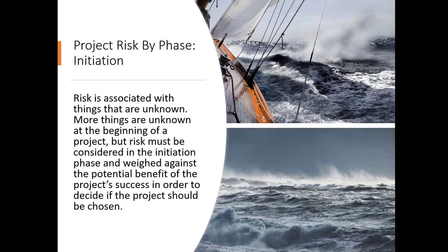So project risk by phase. Let's look at the initiation phase. Risk is associated with things that are unknown. More things are unknown at the beginning of a project, but risk must be considered in the initiation phase and weighed against the potential benefit of the project's success in order to decide if the project should be chosen.